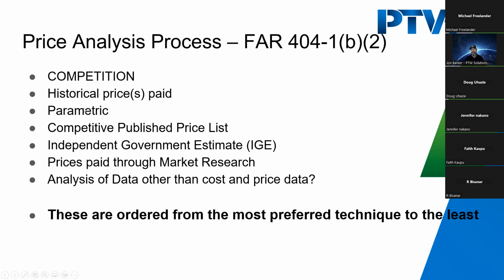Parametric price analysis is generally used on commodities, like think gasoline and something like gold, right? So those are parametric pricing techniques that you would use. I'm using whatever index for this commodity as my basis, and I paid this amount that's less or higher depending on the circumstances, what's behind that procurement, right?